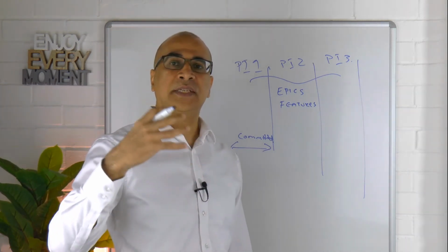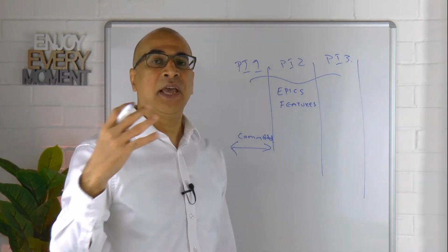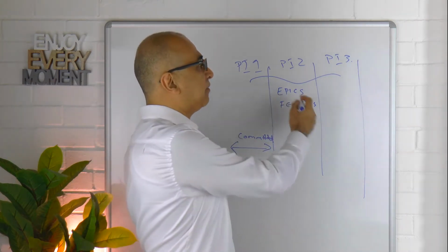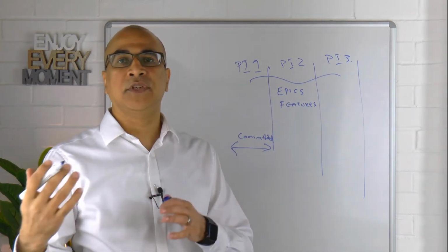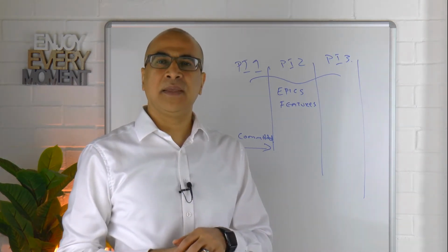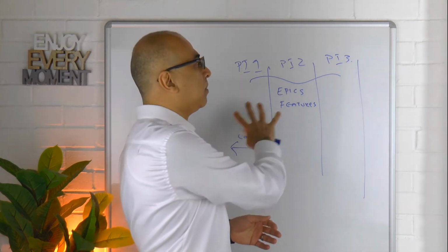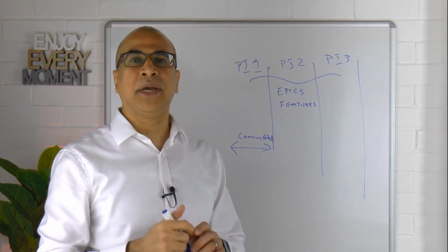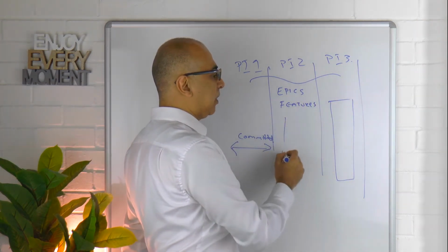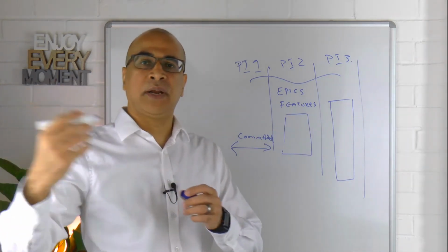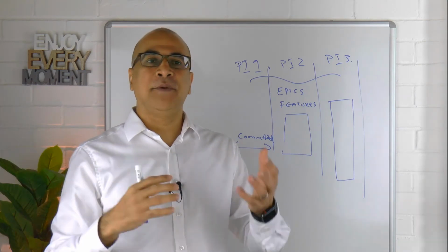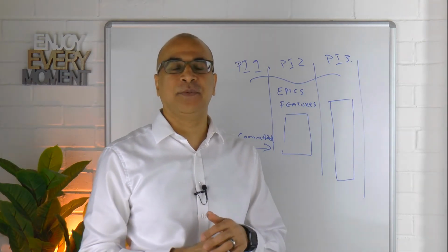Remember, this is aspiration, this is linked into our vision, and this is something that could yet be to be defined. But we do want to have some indication of the kind of timelines and other things as well, so that we can actually put them in. The other thing that I would like to say is that this roadmap, we want it to be emergent. So what I mean by that is we want greater flexibility in slack over here and a little bit less over here, because as we go further out into the future, there's going to be more and more ambiguity, more and more unknown, and we need to be able to cater for that as well.